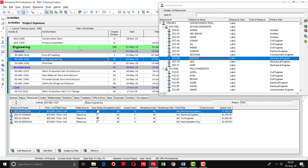These are the persons who are involved in the development of the basic engineering. After that, you can see the budgeted units option and we have to define some man hours for each activity. By default, 80 units are coming for each activity. As you know, we have assigned the head office calendar, which was defined as 8 hours per day. So simply 8 multiplied by 10 gives the budgeted units of 80.